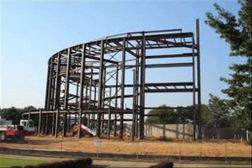The third phase is the vertical build, which you actually build the buildings that go on top of the ground. And we won't build the whole campus at one time, but based on funds and things of that nature, our plan is to start with the first phase building that will get us out on the land and house everything that we have here, allowing us even additional space on top of that. All of that looks to be about 3 to 4 years.